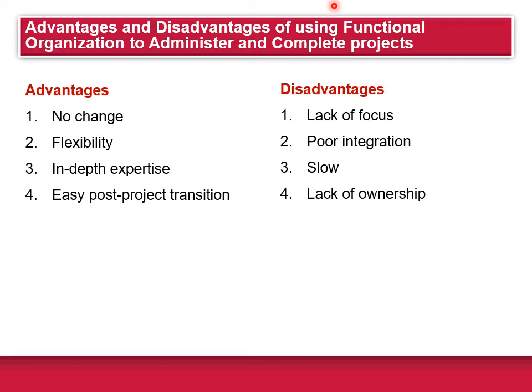The problem is communication, because one division has to talk to another division. One division has to wait on another division to finish their part before they can complete what they need to do. So it can be kind of slow. And the last disadvantage is lack of ownership. There's little motivation for people to work on the project. It's almost seen as an extra burden or extra duty. Also, there's no owner, no one takes pride in the project. It's just everybody's sort of working on something on the side over here. That's a disadvantage.